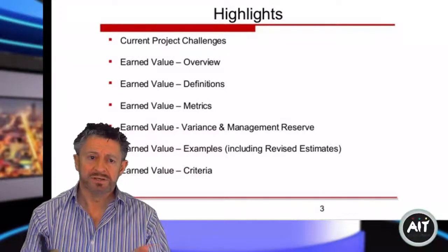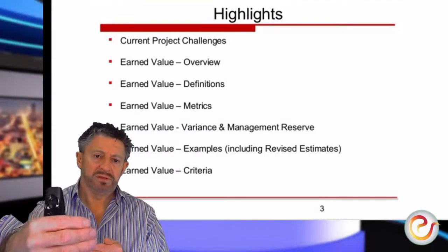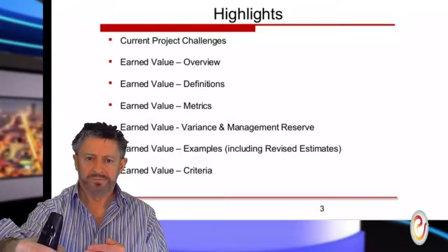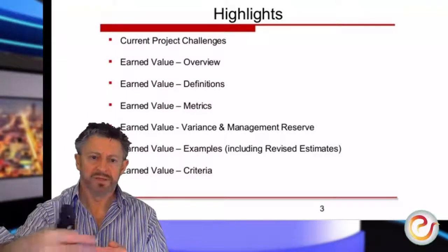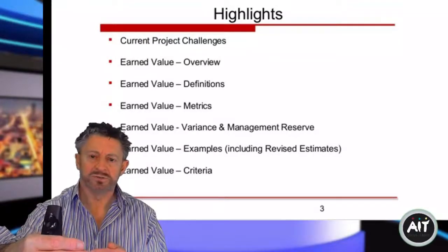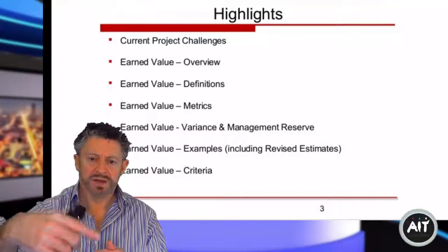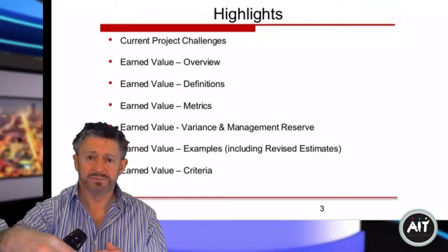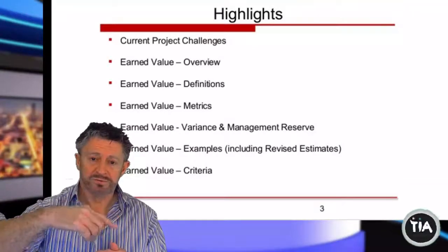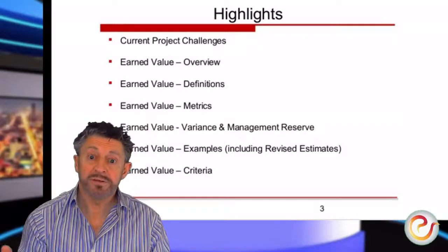You have variances. You budget to spend €1,000 over a week, so that's €200 per day. By Wednesday, you planned to spend 200 on Monday, 200 on Tuesday, and 200 on Wednesday. That's a cumulative budget of 600, but you actually end up spending 350.